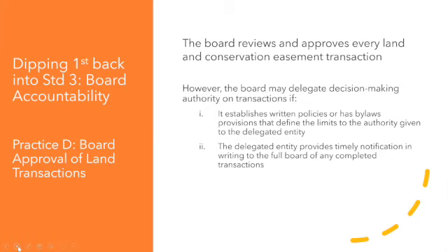But regardless of whether or not any of that happens, your board will make a final review and vote prior to closing on any project, at which time you should have available lots of information about the project, including the results of site visits, analyses of conservation values, and due diligence items like the title investigation, all to help you make your decision.